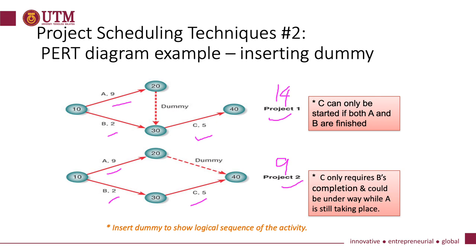The dummy in project 1 is necessary because it indicates a crucial precedence relationship. On the other hand, the dummy in project 2 is not required. Therefore, activity A could have been drawn directly from node 10 to node 40, and event 20 may be eliminated completely. Now, can you draw the revised PERT diagram for project 2?